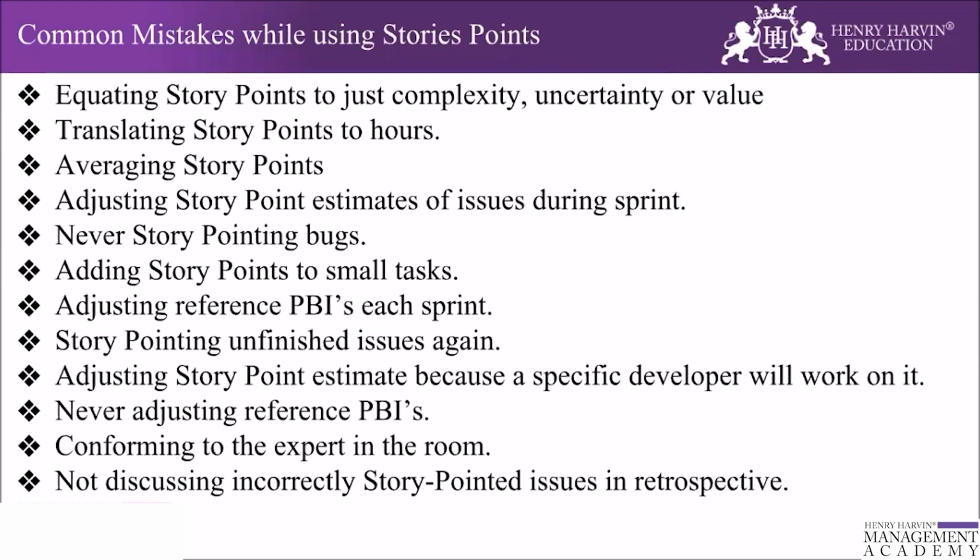Just look at whether you have done these things in the past or you have not done these things in the past. The story point doesn't tell anything about the value of a PBI, and the story point provides a rough estimate. So it could be that this item is extremely valuable or it does not add any value at all. So story point helps determine the ROI of a PBI, so you can take the effort into account to deliver that functionality together with the value. The story points are about effort; complexity, uncertainty, and risk are factors that include effort, but each alone is not enough to determine the effort.